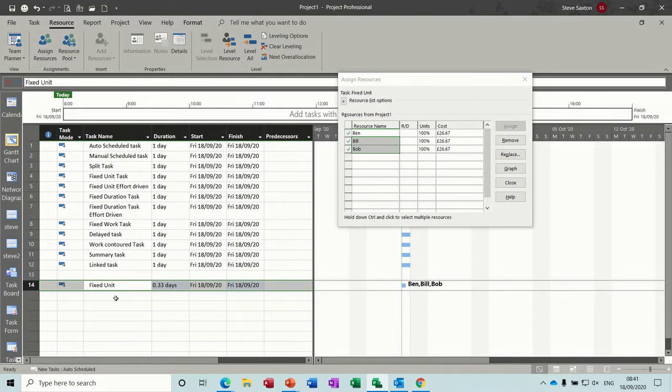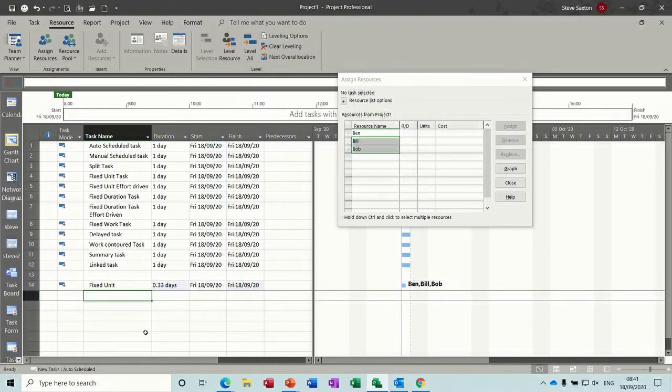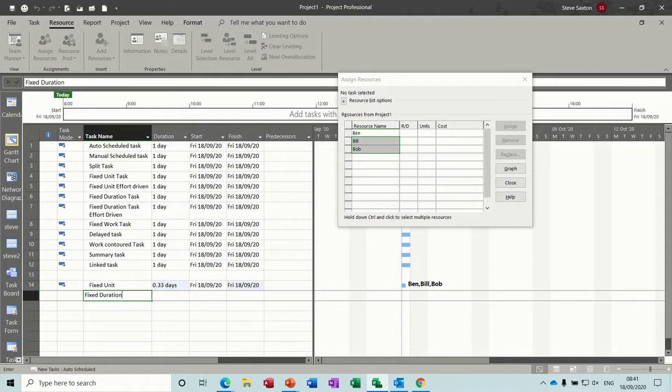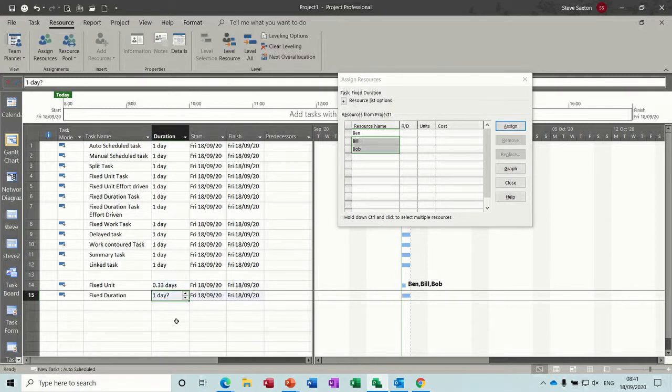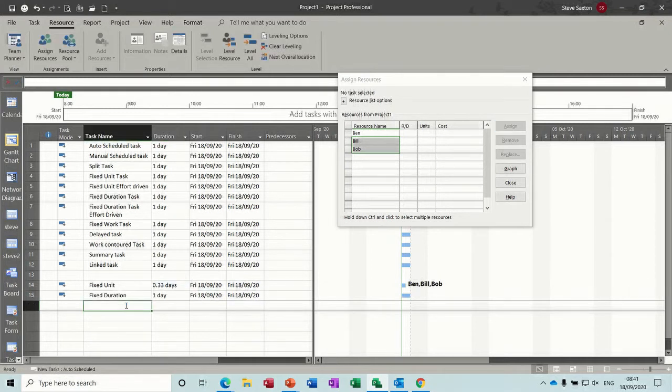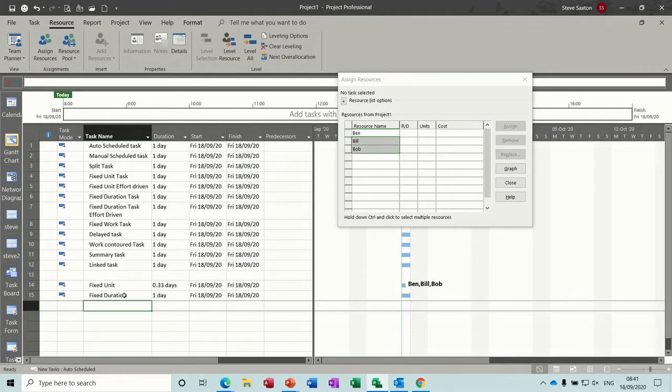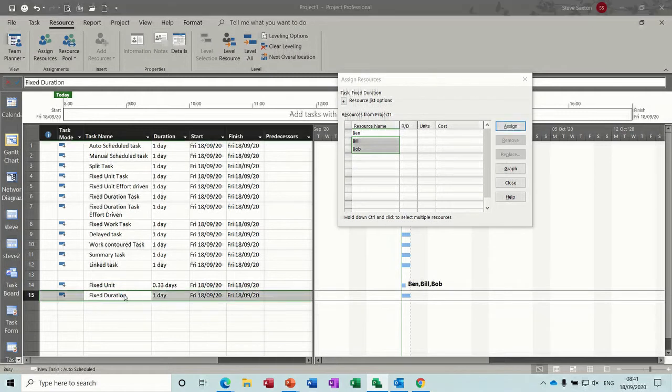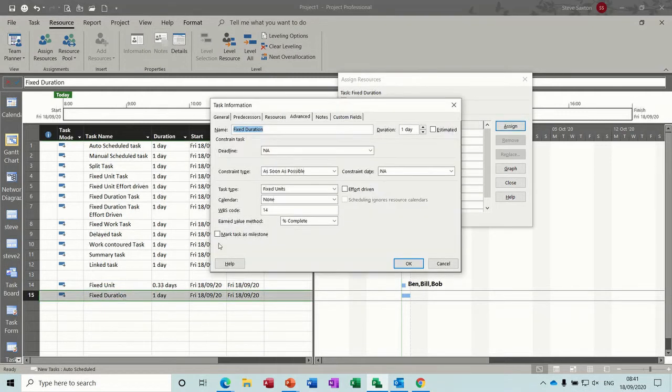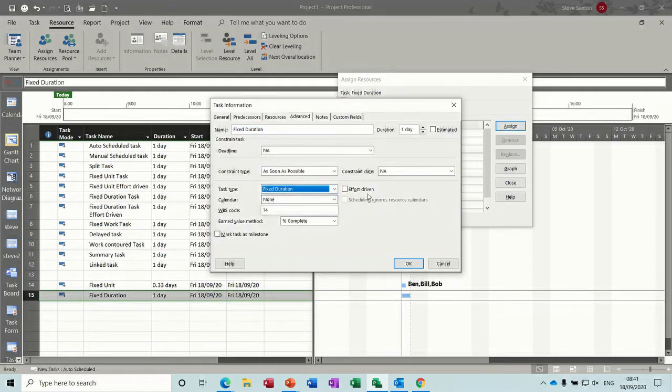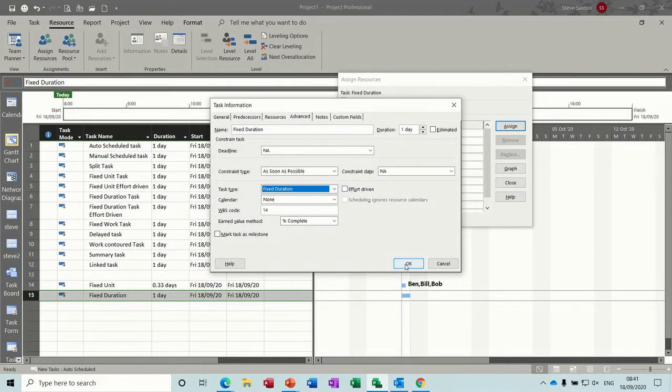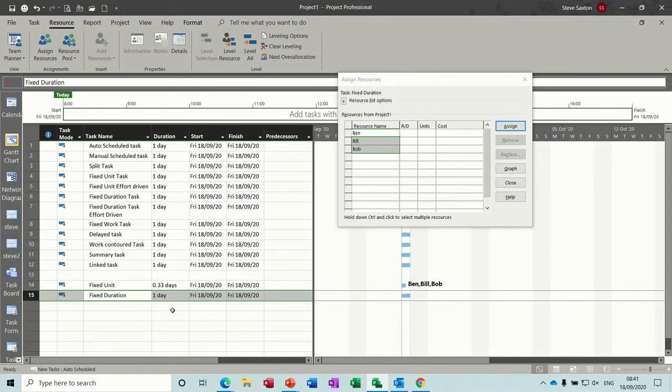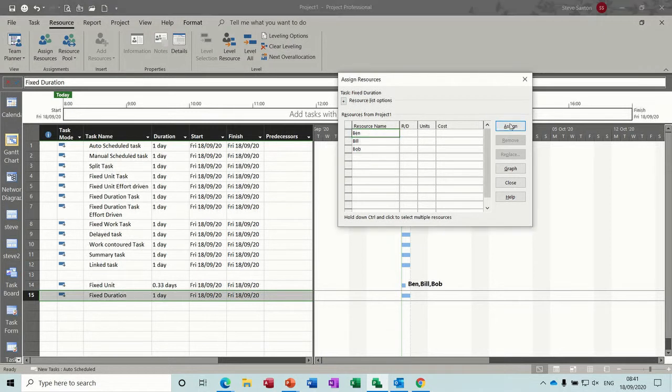Now the next one down is fixed duration. A fixed duration task could be something where you've got concrete that needs to have a fixed drying time, so if whatever, five days before you can put any building material on it. So if I go into there, double click, change this to fixed duration. Again, you've got the effort driven option, but I'm going to leave it off, and assign Ben, my first allocation.